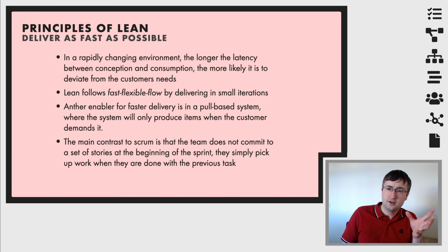The main difference between Lean and Scrum here is that the team isn't going to be committing to a series of stories at the start. We don't have a sprint backlog per se anytime that we're carrying out Lean.